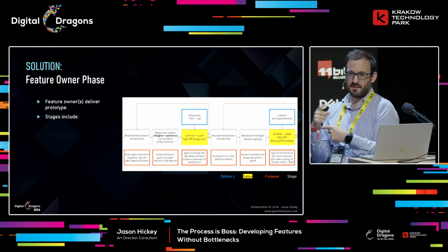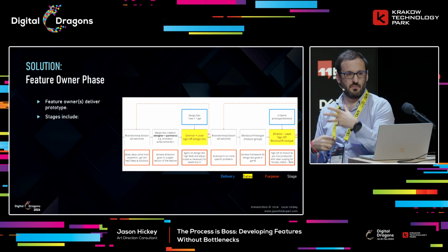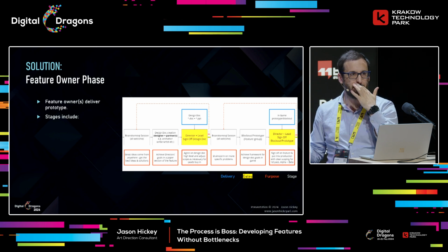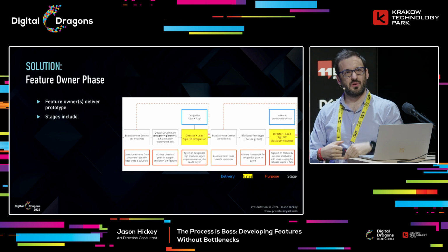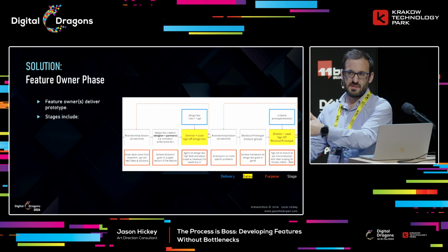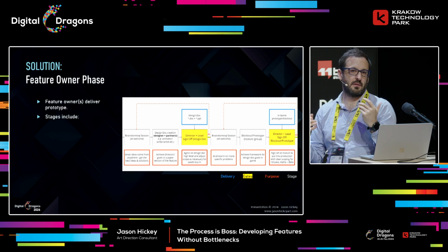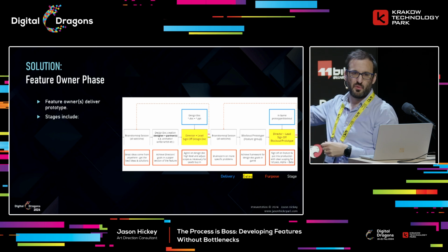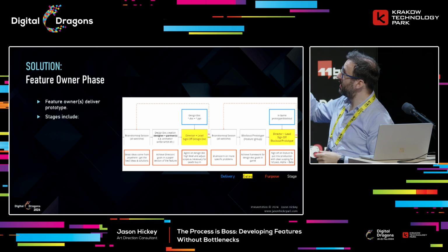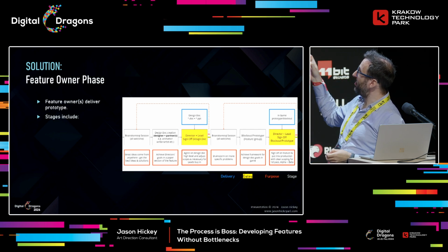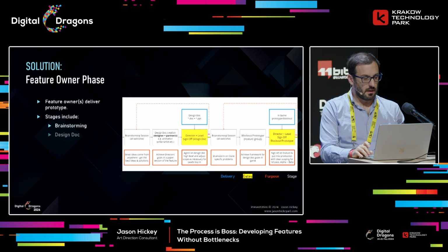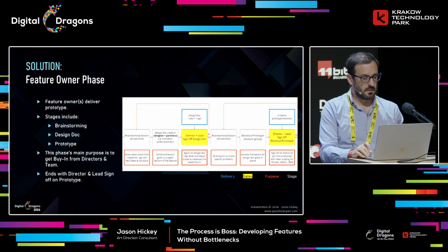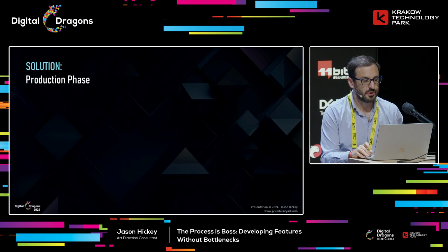And then you'll probably have some caveats, like we'll do this level, but, for example, we know it's set in a factory, but how are we going to do three puzzles that use physics in a factory? Can you go out and solve those? And that would be your next brainstorming session. Then you're going to do the prototype, and you get sign off. So that ends with sign off on the prototype, and then you move into production.